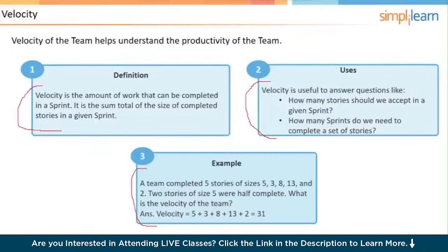But it's not going to be 36 because the only thing that counts towards progress is working software. So even if the team had finished 9 out of 10 story points for a user story, meaning it's almost done, and then the sprint ends, that doesn't get counted towards velocity.